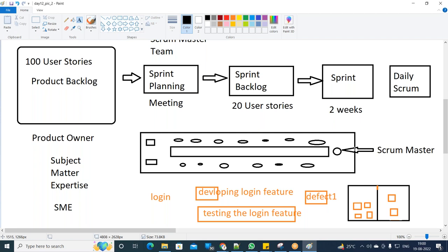So the scrum master or whoever is responsible will add the sticky notes, or move the sticky notes from left hand side to right hand side if they say that particular thing has been done. Let's say there is a task belonging to Shireen Khan. Shireen Khan will stand up and say this task is mine, and she has done it. The scrum master will move it from left hand side to right hand side, and Shireen Khan says that today my plan is blah blah blah.